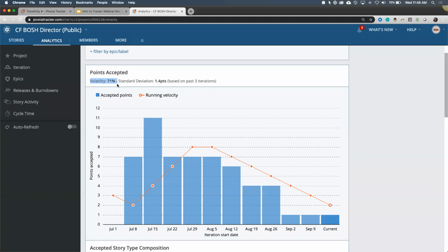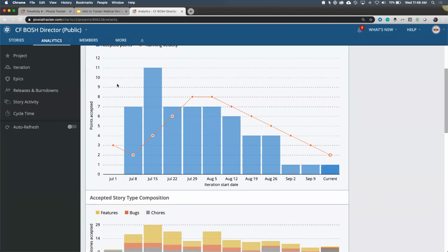I have seen different development teams that are like, well, our velocity is 20 and your velocity is 15, so we're getting more done. Well, not necessarily, because people estimate stories differently. If you want to game a metric, game volatility, because having a low volatility, that's bragging rights. So that's your number to look at.